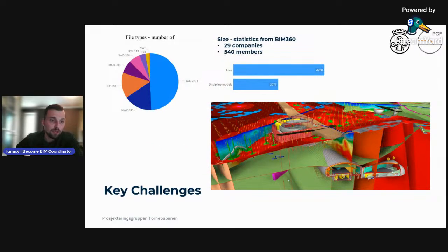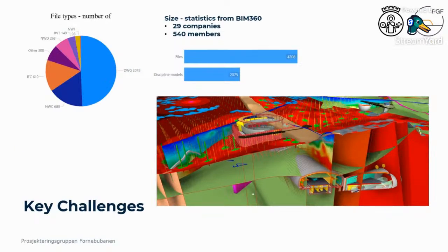There are, of course, several demanding characteristics of this project. Firstly, there is a challenge of ground conditions, the construction completions with large pits in narrow urban areas. Also there is interference with existing infrastructure like metros, railway, and tram systems. And this causes Fornebu to be one of the most challenging projects in modern Norwegian history.